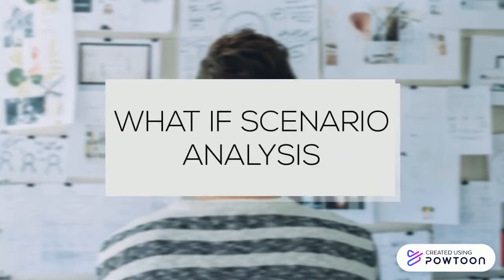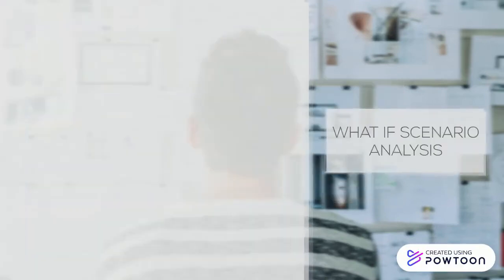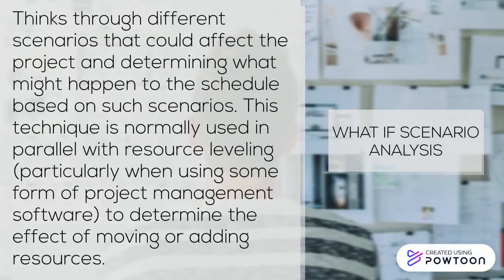What-if scenario analysis. This technique thinks through different scenarios that could affect the project and determines what might happen to the schedule based on such scenarios. This technique is normally used in parallel with resource leveling, particularly when using some form of project management software to determine the effect of moving or adding resources.